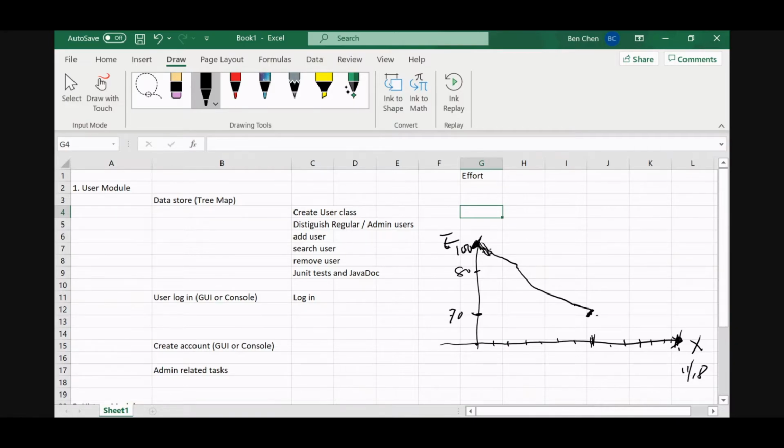Now, somebody when they make the story lines decided to mix everything. So they spend an hour on user, then 2 hours on trails, 2 hours on history. That's not a good idea, because the whole idea of agile design is you want to finish each task completely or almost completely before you take on another task.